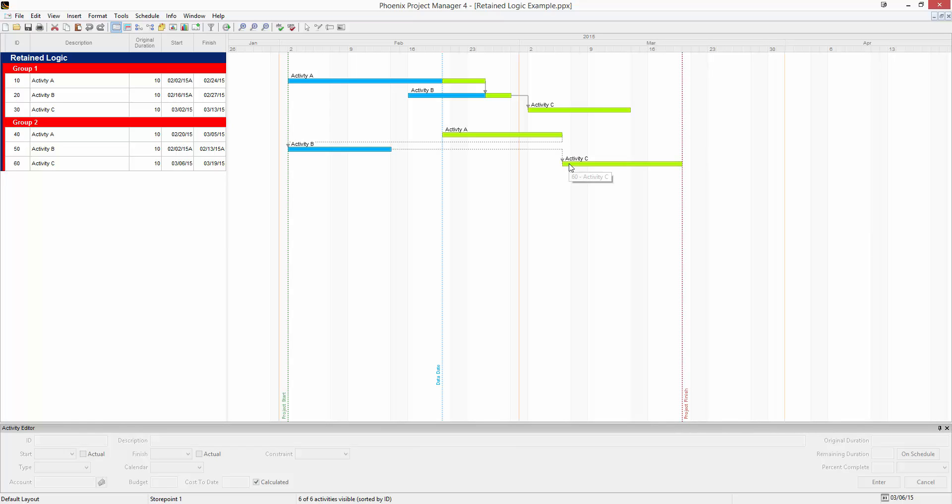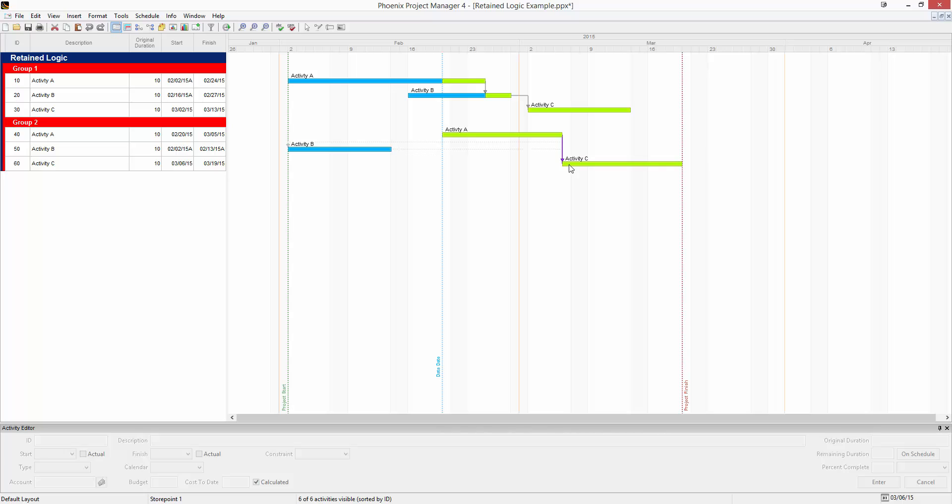This isn't very apparent from the relationship that's shown, but in Phoenix we draw something we call the retained logic relationship. In the group two example, when we schedule, a purple line will appear to show this retained logic relationship so you don't have to hunt down for what is holding activity C out.